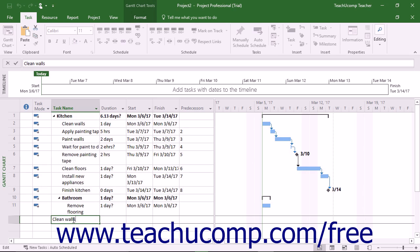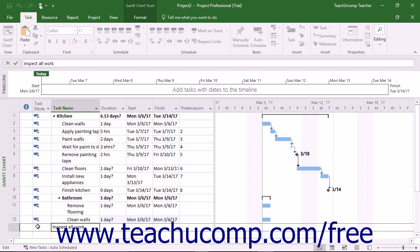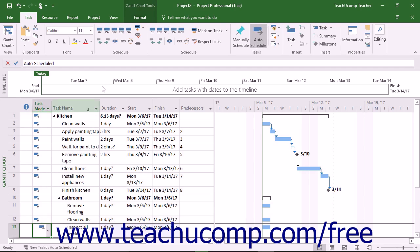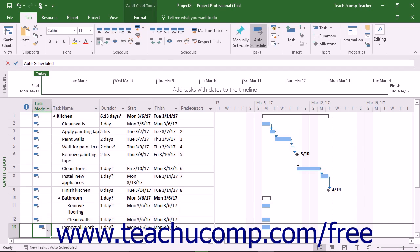When you need to create a new primary task that is not part of the summary task, type its name into the task name cell. Next, click the OutDent Task button that appears in the Schedule button group on the Task tab of the ribbon to remove the task from the summary task above.